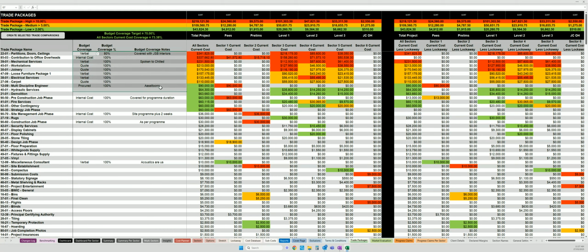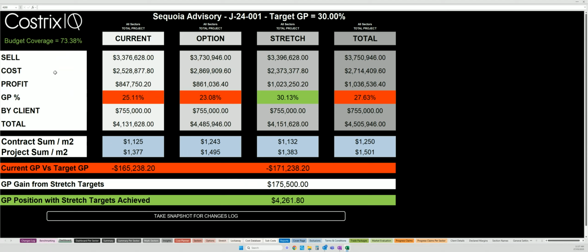So if I was reviewing this as a manager, I'd be going, okay, this project's in a good position. We're at 70, 73, 74 budget coverage. It's against all the high risk packages. I now believe this scenario that you're presenting. So you can see how budget coverage can provide a bit of a sensitivity analysis or a risk evaluation on numbers that are being reported within the system.